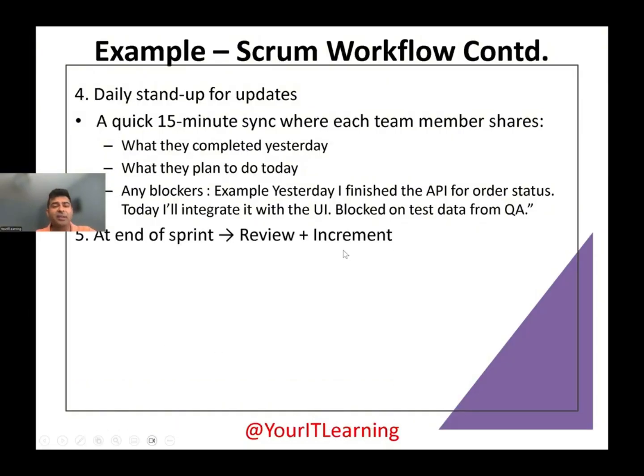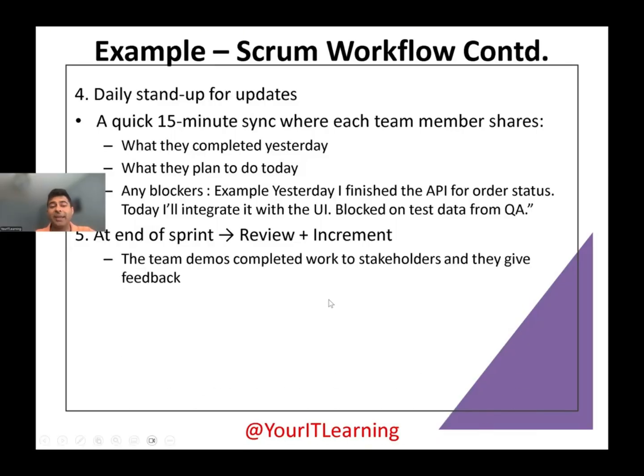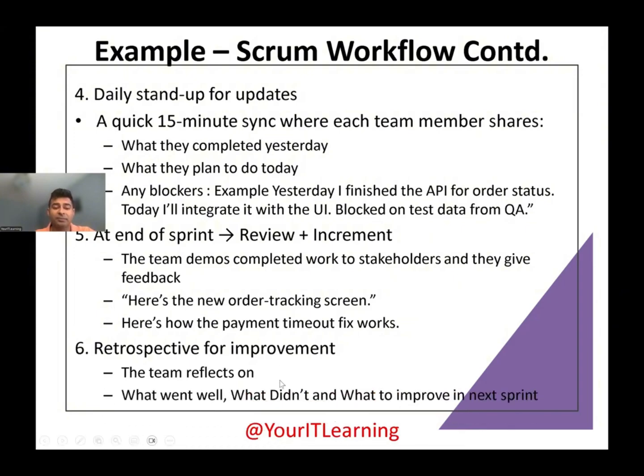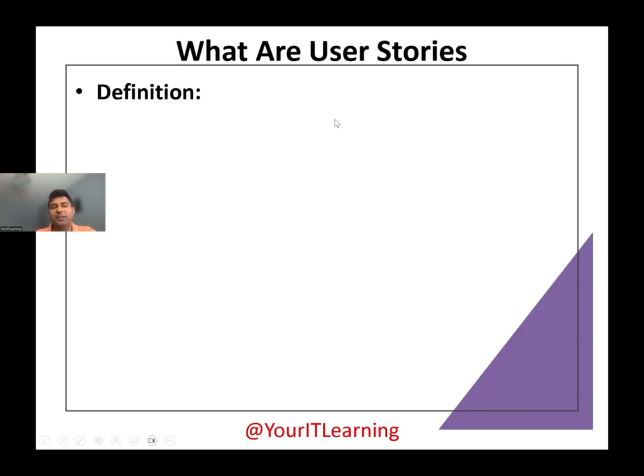At end of the sprint, review and increment: the team demos completed work to stakeholders and they give feedback. Here's the new order tracking screen, here's how the payment timeout fix works. Retrospective for improvements: the team reflects on what went well, what didn't go well, and what to improve in the next sprint.